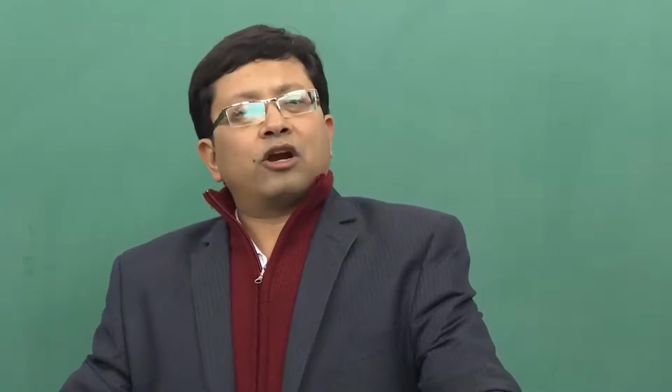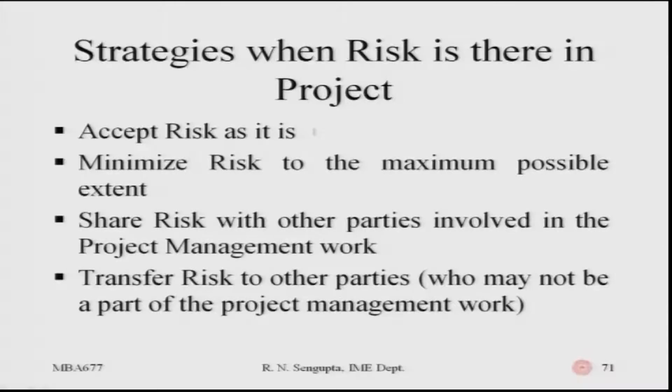Another way would be, considering that risk is there and you cannot make it 0, try to minimize it. Minimization can be trying to dovetail the work in such a way that two works can start consequently or subsequently, such that there is no misutilization of the resources, in the sense that the utilization of resources is done in such a way that one resource utilization in event 1 or work 1 or job 1 does not affect the utilization of resources for job 2 or event 2.